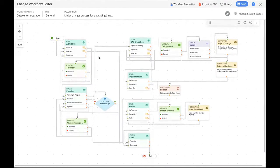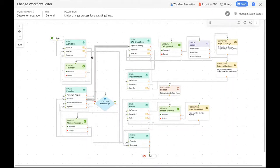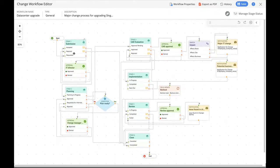You can see six stages: submission, planning, CAB evaluation, implementation, review, and close. Under each stage, there are statuses that a change request goes through at each stage. For instance, a change request in the submission stage would take up the requested status, accepted, or rejected status. The lines are called connectors and they signify the direction and path of the change. Let's visualize one of the paths a change request would take using Zilker's workflow. Once the change request starts, it takes the requested status, then moves to the second type of node — the approval node.